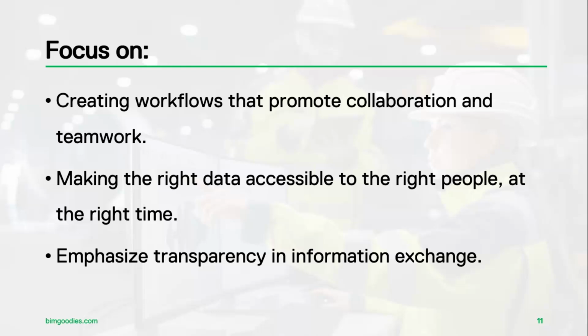This transparency would come, for example, let's look at first, if I were in a disconnected team where we are working without someone being able to see the progress that we are making. For example, I'm working in a QS firm in an office, and I require information possibly from the engineers and the architects to finalize the tender documents that I am producing. Maybe I need to give a date when these documents will be available. I also need to understand what progress these other parties have made, because I require their information as an input into my process. So can we see the progress that one person has made, so that we can base our decisions on it if required?